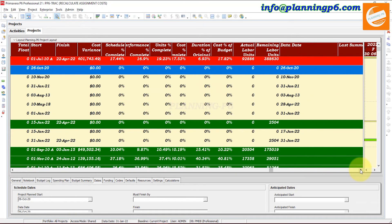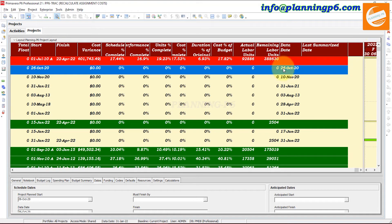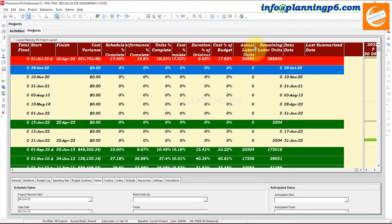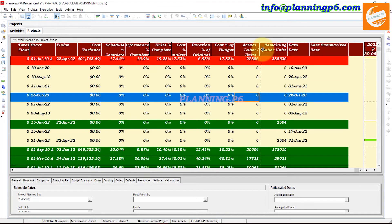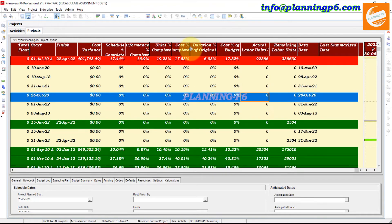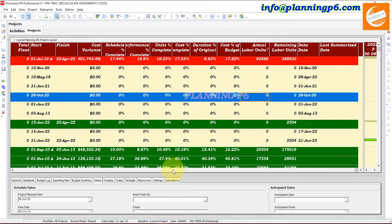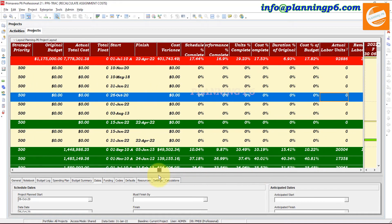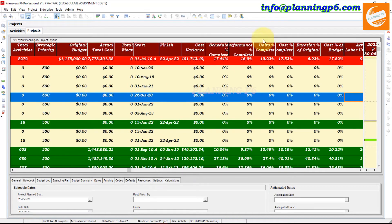Now Data Date is showing here, but other values are not showing. How can we show them? If we are generating a summary or portfolio report, how can we display all those values? The reason is only the last open project is showing its data — Start, Finish, and other values appear only for the open project. So now we will do the Summarization to show the data for all projects here.